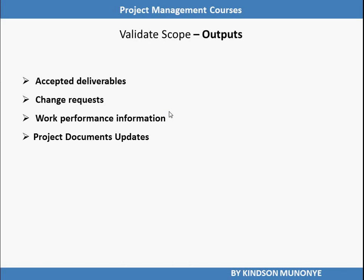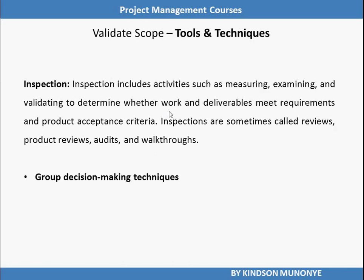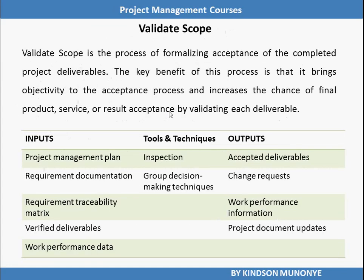This is where we come close to the end of the Validate Scope process. A brief recap: take note of the inputs — Project Management Plan, Requirements Documentation, Requirements Traceability Matrix, and Verified Deliverables. Quick quiz: where do we get the Verified Deliverables from? Verified Deliverables is an output of the Control Quality process. Work Performance Data is also an input. The two tools and techniques are Inspection and Group Decision Making Techniques. Outputs are Accepted Deliverables, Change Requests, Work Performance Information, and Project Document Updates.